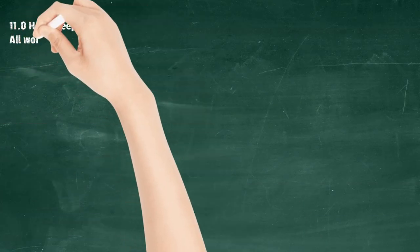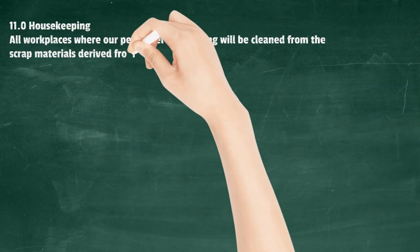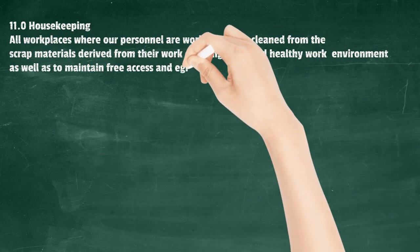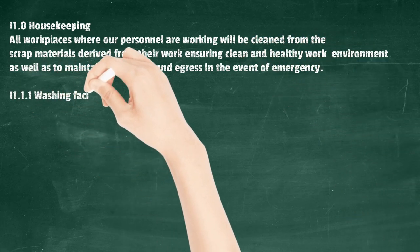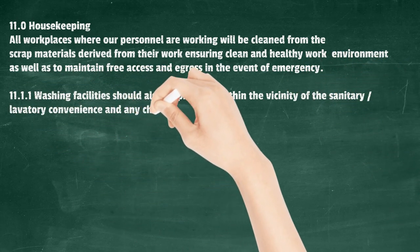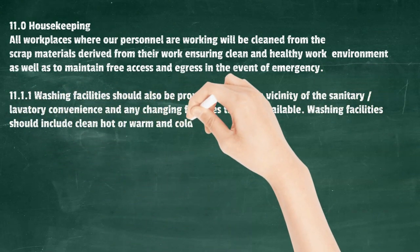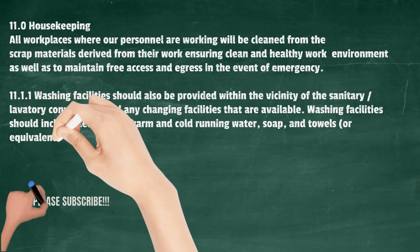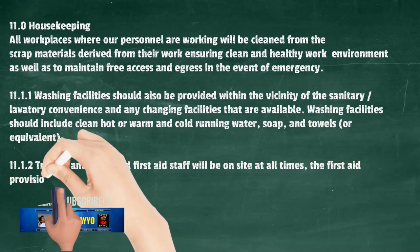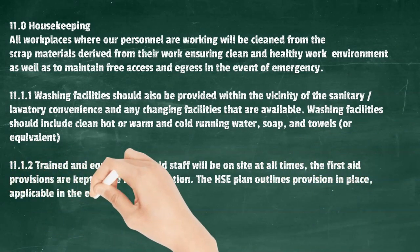Housekeeping: All workplaces where personnel are working will be cleaned from scrap materials derived from their work, ensuring a clean and healthy work environment and maintaining free access and egress in the event of emergency. Washing facilities shall be provided within the vicinity of sanitary/lavatory conveniences, including clean hot or warm and cold running water, soap, and towels or equivalent. Trained and equipped first aid staff will be on site at all times, with first aid provisions kept in the first aid station.